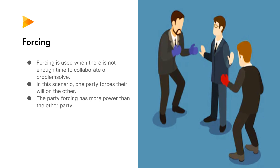Example 1: Health and safety emergency. Imagine a construction project where there is a sudden and critical safety issue — such as a structural integrity concern posing an immediate risk to workers. The project manager, who has authority over health and safety decisions, identifies the problem and orders a halt to all work until the issue is addressed. In a forcing approach, the project manager makes a decisive decision based on their authority and expertise, as the urgency does not allow for extended collaboration. The decision is imposed on the project team and stakeholders to immediately address the safety concern.